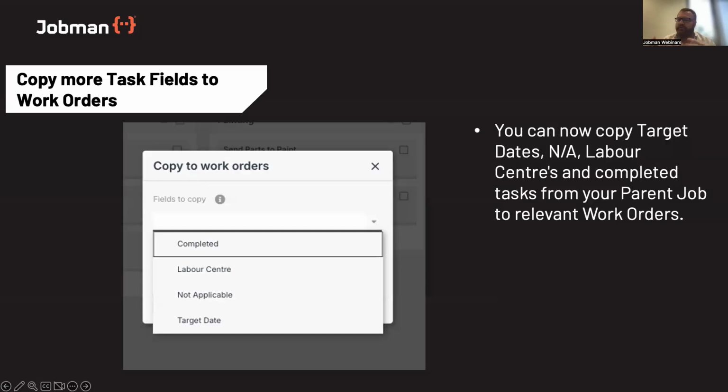A lot of companies, especially as they start growing and scaling, might have multiple CNC machines. Now, the automation of the software is designed so that when we're taking a quote and we're quoting those operational hours and we want to report on them, and we bring that lead into the job, it's not at that point that we're actually defining where that job goes. So one of the great foundational abilities of the software is, of course, to use staff members and member types to quickly decide who through the process is going to be doing that flow. Who's going to be the production detailer, which CNC machine, which assembler, which installer, if you want to go to that level. So we can really direct the management and make sure we're getting optimal efficiency.